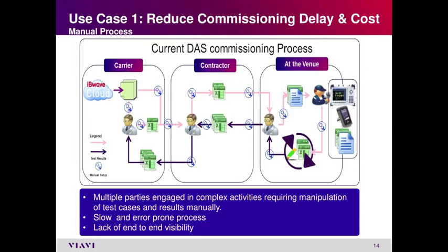Imagine if an operator has to deploy hundreds of DAS in a year. For every venue, depending on the size of the venue, it can go anywhere from multiple weeks to, I've seen some cases, over a year or a year and a half, depending on how complicated the DAS was. So you can see, if these steps can be streamlined, that can significantly reduce the cost and increase the number of DASs that can be deployed.